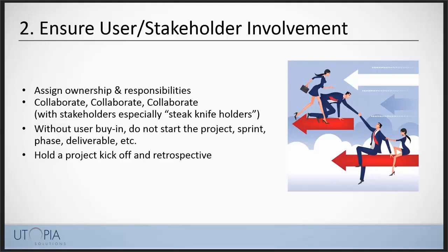And at the end of this meeting, you want to take a survey. Have everyone hold up one hand, 0 through 5 fingers, as a confidence level. So 5 fingers, they're totally confident in this plan and the approach. 0, they lack confidence completely. Anybody that has 3 or less fingers held up, you want to talk to them in front of everybody, find out why, and address those issues right there. And then, I can't stress this enough, expect the plan to change. Anybody involved in Agile is going to know this, but expect your plan to change.